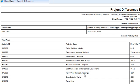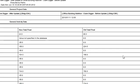In this instance, the first subject area that was evaluated is Total Float. So I can see all of the activities whose total float has changed from the original project over here on the right to the revised project.